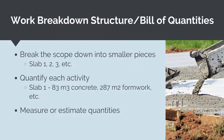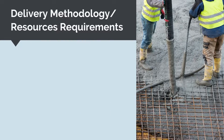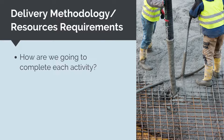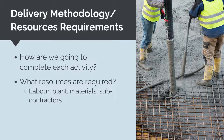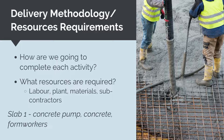It is critical to get these quantities right because these quantities will ultimately be driving our cost. For each activity in our WBS, we then need to understand what resources we need. We need to understand the delivery methodology and exactly how we are going to do the work and what is required to do it. The resources needed for each activity will be a combination of labor, plant, materials and subcontractors. For example, for slab 1, we would need concrete, a concrete pump, concreters, formworkers and so on.